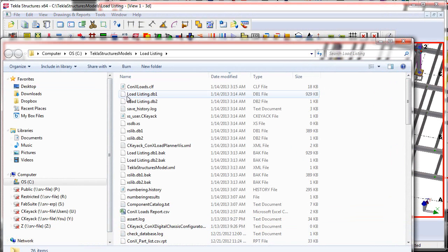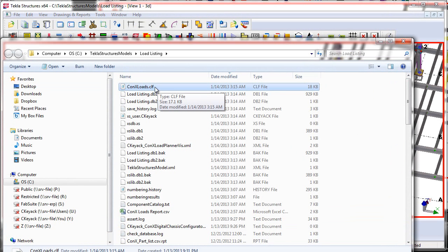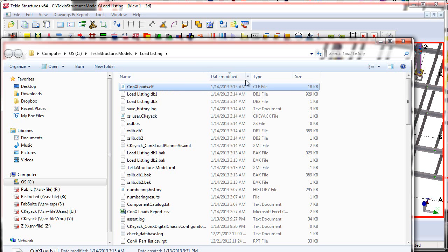And I want to make sure that I copy the ConnexLoads.clf file from the previous copy of the model folder where I originally planned my loads, and copy that into the new model folder that I just received from the detailer.